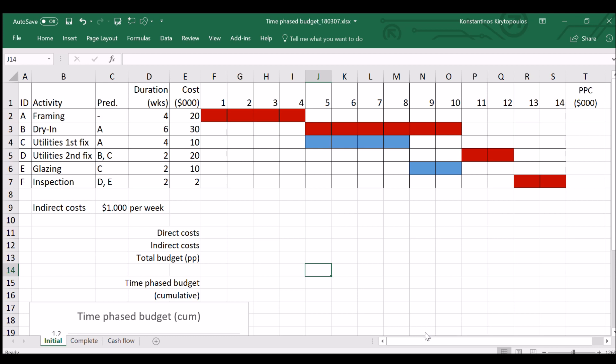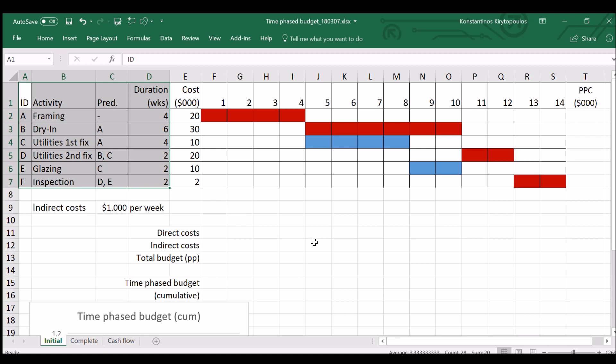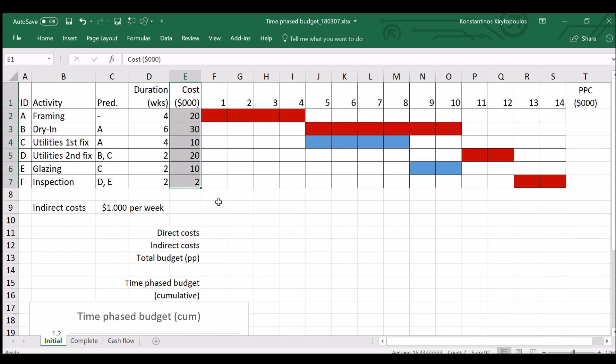Let's come back to our favorite project. So you have the typical table: activity, predecessor, duration, and this time the new column is cost. So here you would put the total cost of the activity, this is expressed in thousand dollars, so $20,000 for framing, $30,000 for drying, and so on.